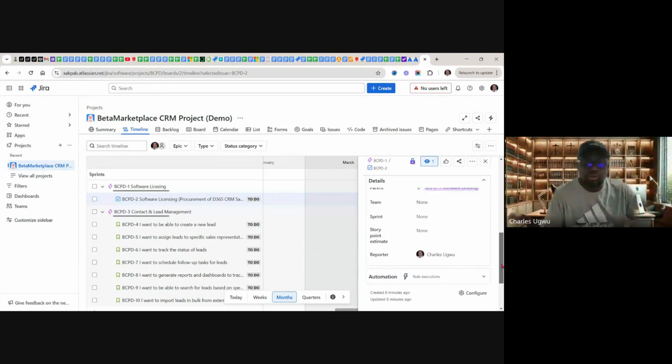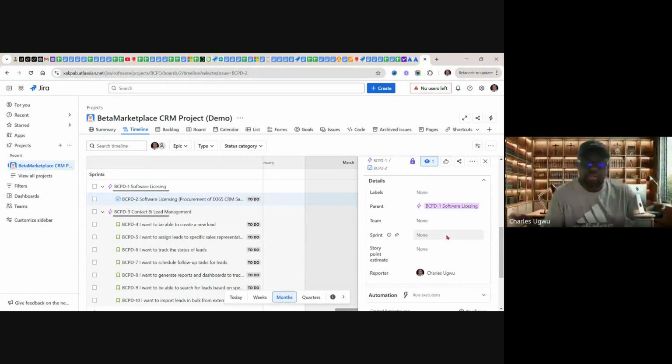So we're going to look at the estimation. Who is expected to do this? A business analyst. You are expected to procure this. And you need to tell the team how long you think it will take, or what the effort required is. It is a straightforward activity. So the story point is going to be estimated within the range of 1 to 10, with 1 being the easiest.